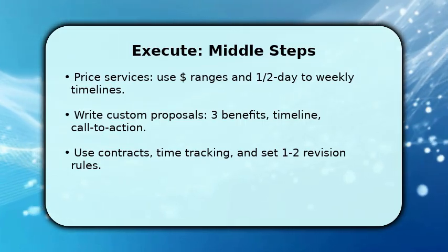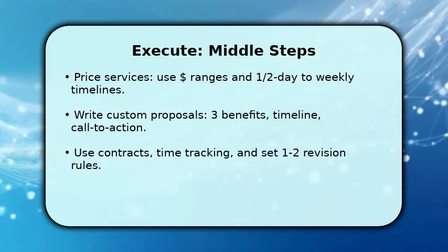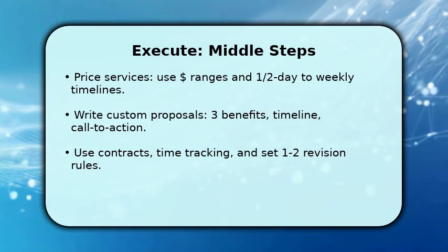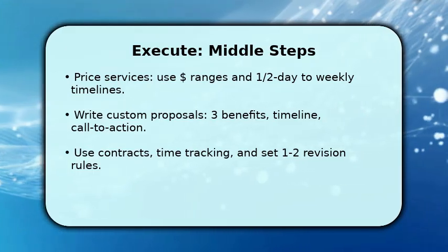Use a simple contract and enable time tracking for hourly work and define 1 to 2 revision rounds up front. These practices reduce scope creep and make delivery predictable for both you and the client.